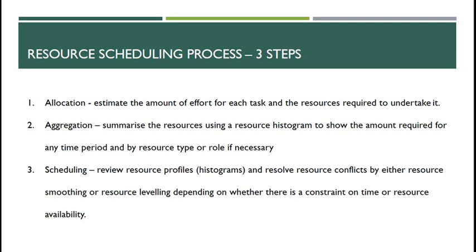And the third one is scheduling, where again you use the resource profiles, the histograms, and resolve any conflicts by either resource smoothing or levelling, depending on where there is a constraint on time or resource availability. And we're going to talk a little bit about smoothing and levelling shortly.